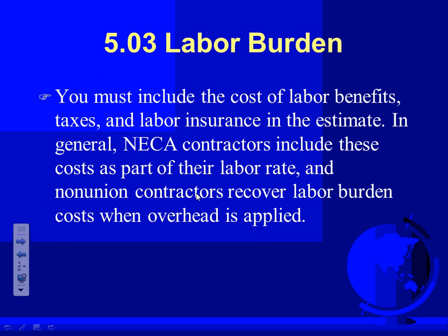Labor burden, guys, you also need to take into consideration how much you're going to pay for health insurance and what not for your employees. So very, very important. Part of their labor rates in the NECA contractor, they added this to their labor rates because the non-union shops, you have to recover this through your overhead. If you're working in a non-union shop, you have to recover it somehow.